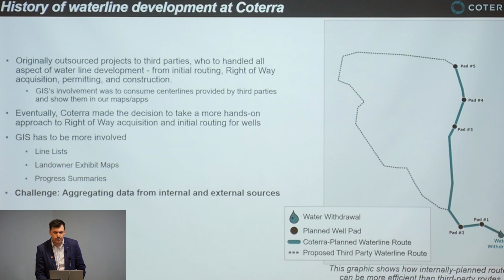One other reason we wanted to take things in-house is because we have prior relationships with a lot of the landowners in our operating area, and we're a known entity to them, and we felt we could be more effective and efficient at acquiring right-of-way than a third party. We know who's good to work with, who's not. We know how to make the most benefit from our time. And last but not least, when doing things in-house, we are better able to adapt to ongoing changes to the drill schedule.